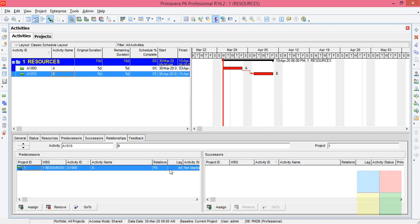When I click on schedule, B activity will start after the completion of A activity depending on the relationship, that is finish to start relationship. I'm not going to change it, let it be in finish to start.